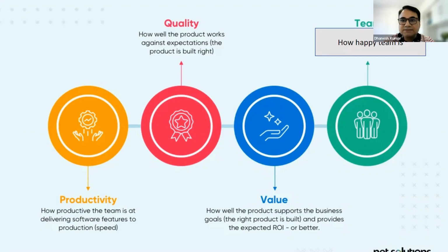Yes, absolutely. It depends on how you slice and dice the data collection. If you simply ask, okay, how are you feeling? Nobody is going to come and say, oh, I'm feeling frustrated, I'm feeling sad about it. But the way you collect that metric matters. If you say, okay, do we have clarity about our role and our day-to-day activities? Do we understand what our product vision is? Do we understand how we are powering the vision of our organization? When we put all of those together as a package, the result you get out of it is an eye opener. So how you do it will also result in a metric becoming vanity versus value.